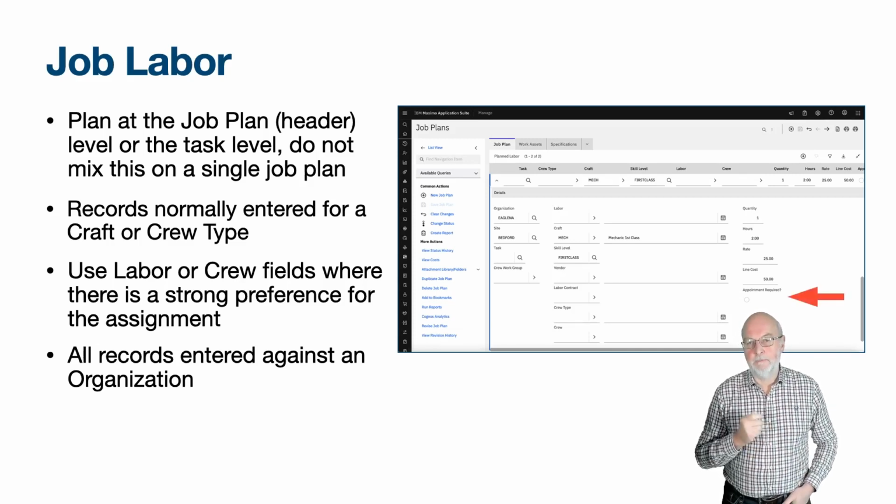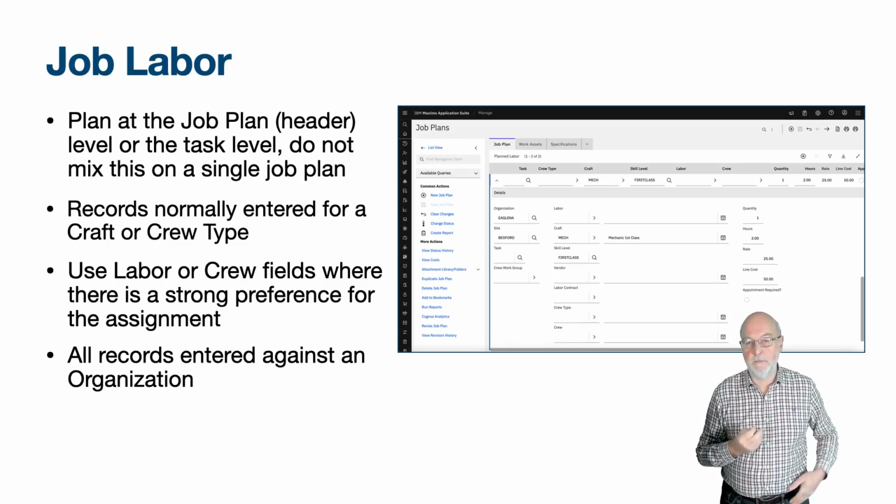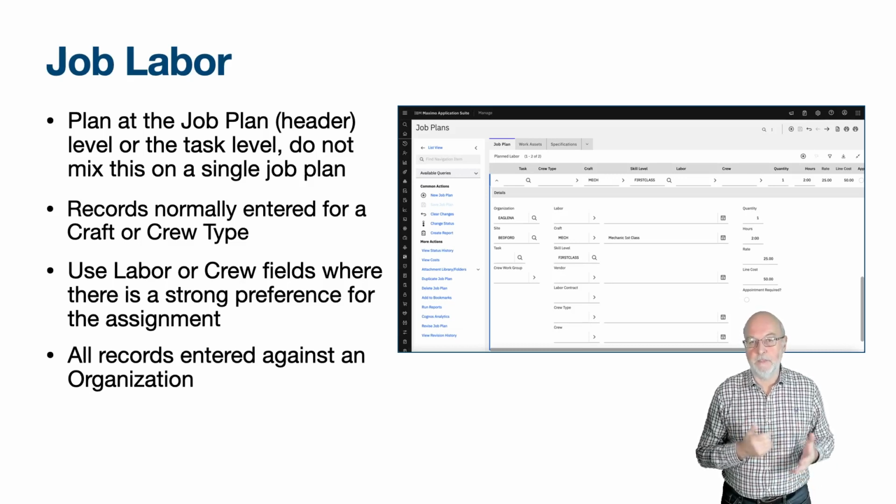You can indicate that the planned labour will require an appointment. If the appointment required field is set, then on the Assignments tab of Work Order Tracking, you will need to set Schedule Lock after you have scheduled the assignment. This locks the schedule dates unless you reset the Schedule Lock field. For example, if the appointment is cancelled or changes.